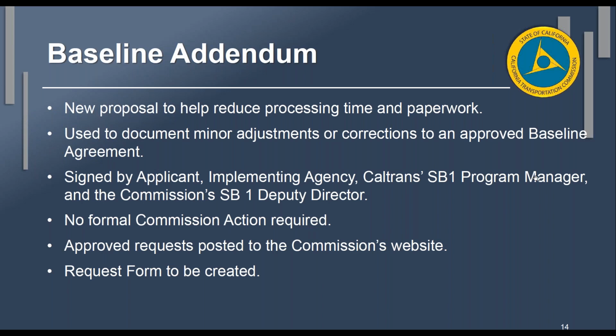So for instance, if a time extension is approved by the commission and we want to ensure that that record is included in the baseline agreement as information that will carry forward with the baseline agreement, it could be incorporated through this addendum process, but that time extension still has a commission action behind it.